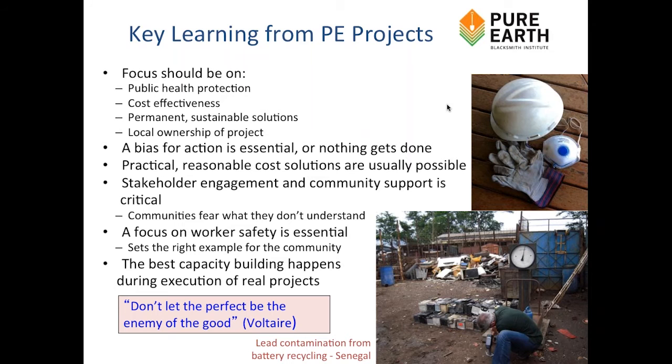In Indonesia, the goal was to have the public education for 100% of the villagers, and that was a series of 3 different group public education sessions and then door-to-door education for every villager. In Zamfara, all the education was done door-to-door by public health nurses.